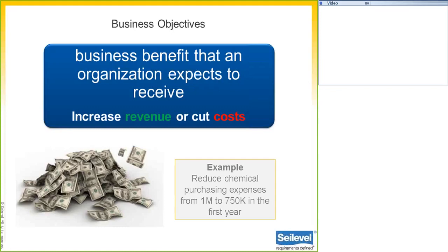You know, I worked on a project, it was 12 years ago, and it was an IT project that was meant to combine 7 different systems into one. And I will tell you that, that's what IT believed the business objective was: let's combine these systems into one. But at the end of the day, that's not a business objective. It may be a solution to a very real business problem, but at the end of the day, the business never cares that there's 1 system or 2 systems or 7 systems. That's just not important to them. There's no dollar benefit associated with that the way it's stated.